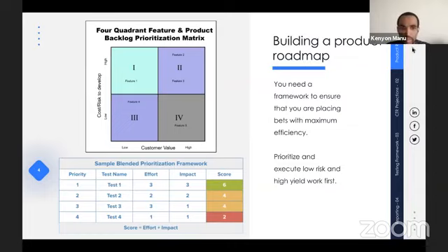Another important thing to look at is you might be a little bit confused, saying effort is a 3. Shouldn't a high effort have a low score? The effort scale is inverted, so that a low effort actually has a high effort score. So test 1 has the lowest effort, even though its score is highest. It's just set up that way so that it's easy to see the score when it comes through. That has the highest score because it has the lowest effort and the highest impact. So that's how those numbers are set up and how it's structured.